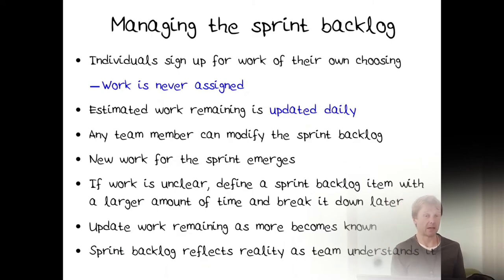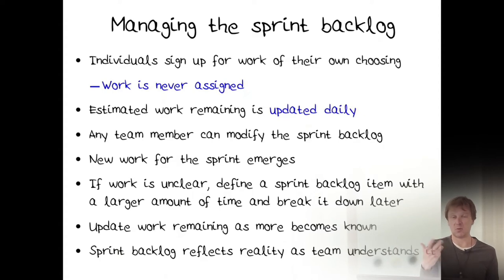You're not signing up for a task that you don't think you're going to be able to do, right? And you're not signing up for a task that you know somebody else on the team would easily do in half an hour, when it might take you 2 days to do it, right? So your goal is the team delivering something, right? So you're smart about how you use your time. And work is never, ever assigned. So you say what you want to do.